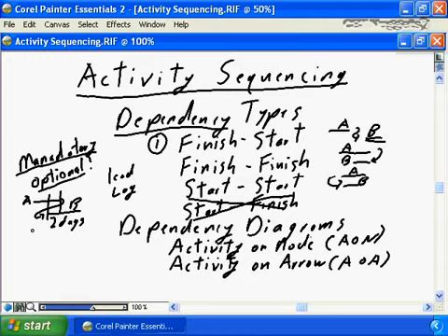A lag is just the opposite. A and a lag of 2 days, meaning that B cannot start until 2 days after A is completed. A is the completion of a deliverable, and the lag is the acceptance process for the deliverable to be accepted before B, the next activity, can be initiated.